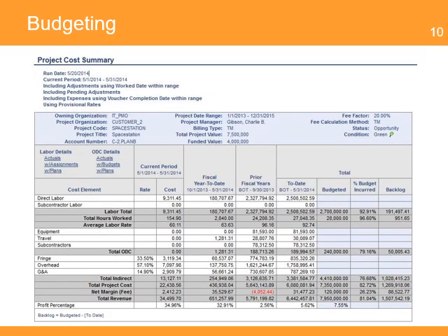The budgeting feature of a PMIS permits the creation of a detailed budget by adding the cost estimates to each activity. Some software tools include the use of cost accounting codes that will allow the integration with the organization's accounting systems. Creating a monitoring budget is an essential functionality of any good PMIS.